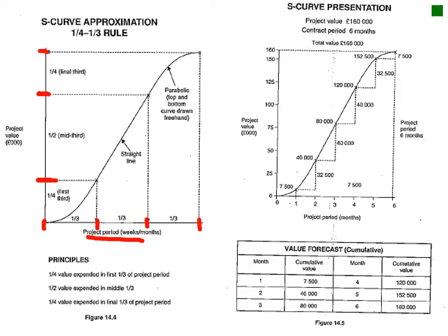Okay. Then your S-curve representation, present value is 160,000. Okay, so they just made an example here of how it will actually look, and you can see that this principle is more or less the same. So this is a very quick way of getting to a cash flow projection. Okay, usually when you check cash flows given to you by contractors, this is also a very good way of just checking whether their cash flows are actually within the ballpark.